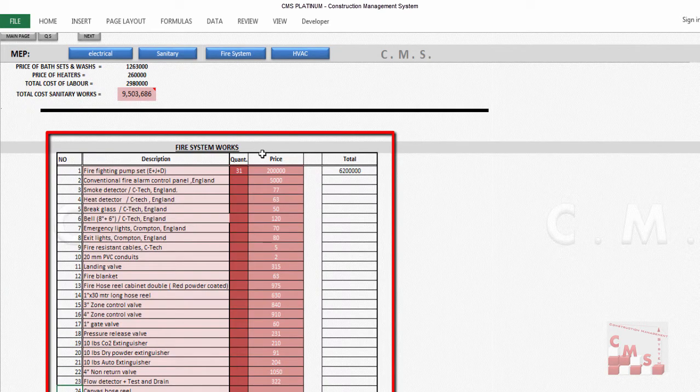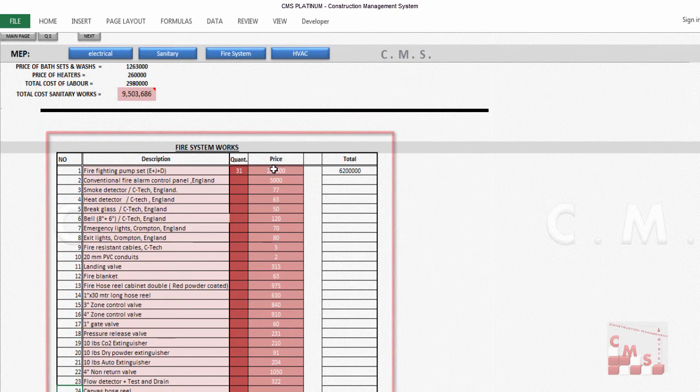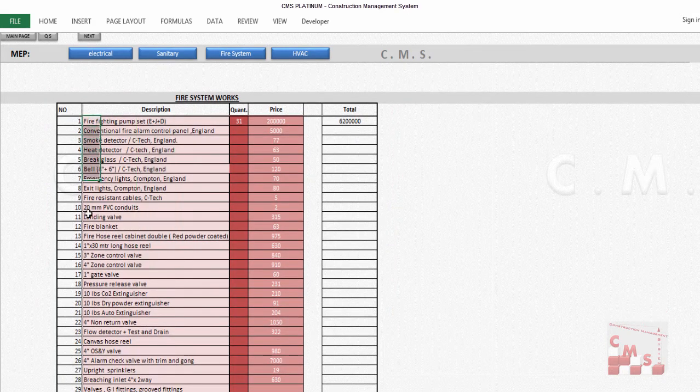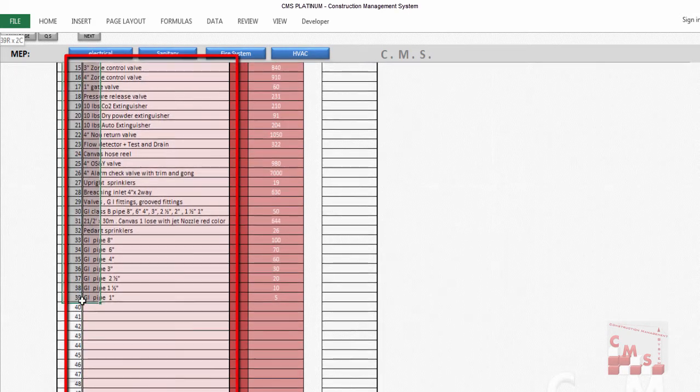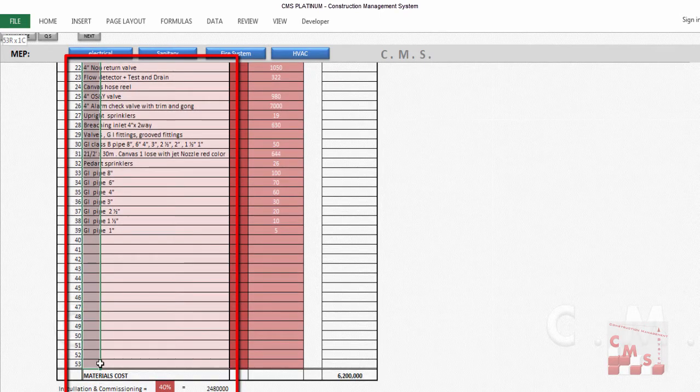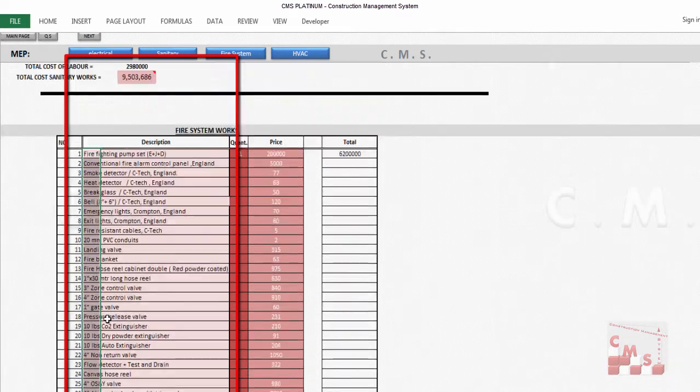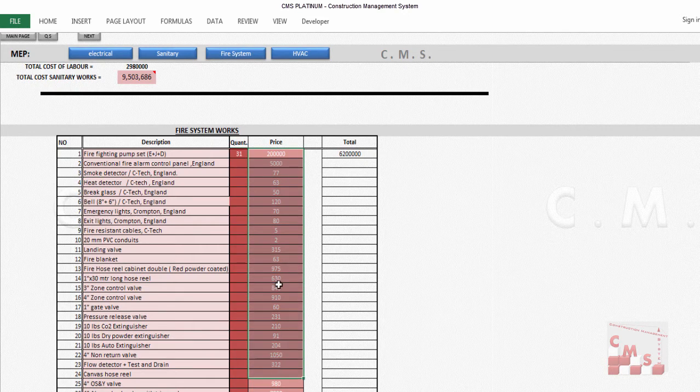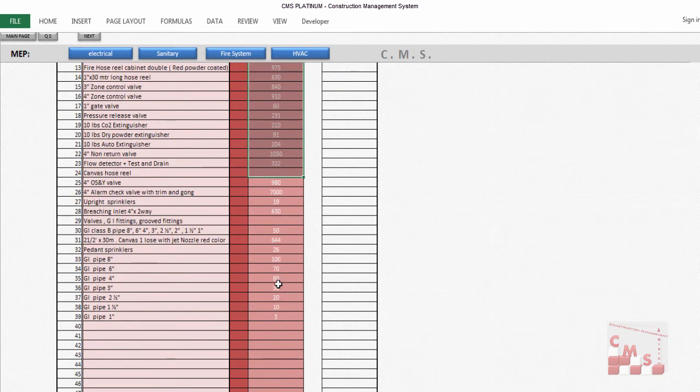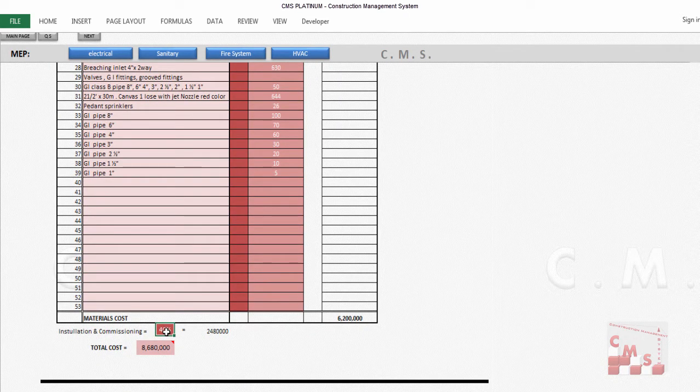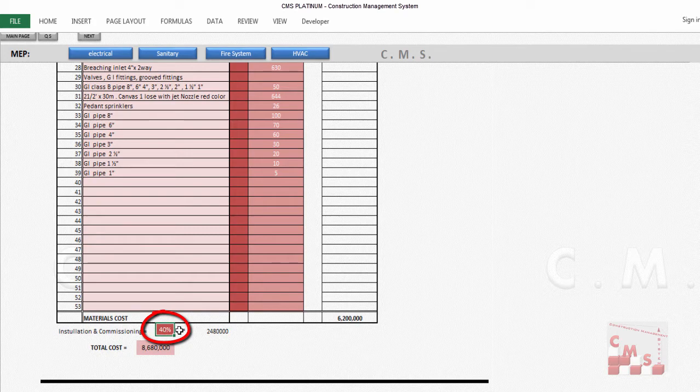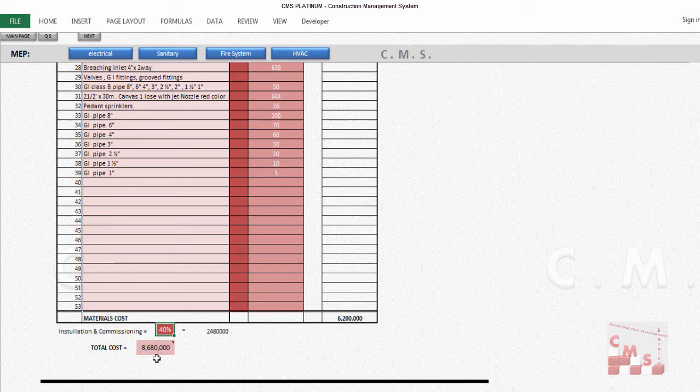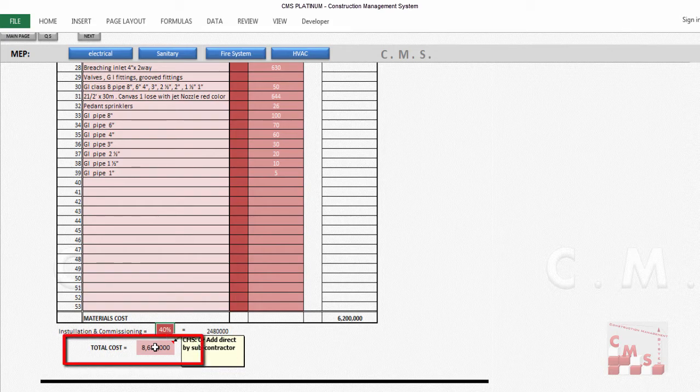CMS also gives a facility to make and find an indication for the fire system. That's most of the materials used in firefighting and fire alarm. You can add here the quantities and the price. Then installation and commissioning for the fire system can be added as a percentage of the materials—that's the common practice in the market. At the end, you'll have the full price for the fire system, fire alarm, and firefighting, or you can add directly the price from the subcontractor.